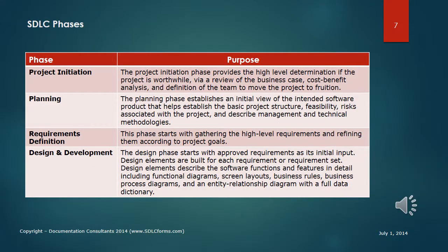The logical sequence required to successfully develop and maintain and eventually retire an application consists of 8 phases. Project initiation. Is the project worthwhile? Is the project cost justifiable? Will the return on investment be realized in reduced labor or actually add to the company's bottom line? Planning. Define the business goals, potential risks, and management direction. Prepare detailed cost estimates for IT costs, development costs, and potentially a project capital versus expense estimate.